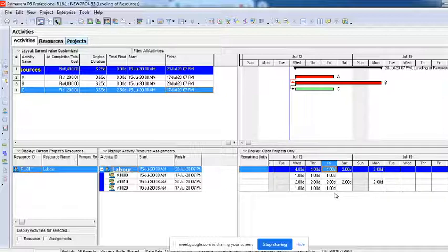What is increasing? Work is increasing because duration is the same. 100 into 10 was the work earlier. Now it is 120 into 10. So what is increasing? Work is increasing. Correct? Sometimes increasing the labors, increasing the resources, is not just about the duration increasing or decreasing. It also affects the work sometimes. You will have to understand this.